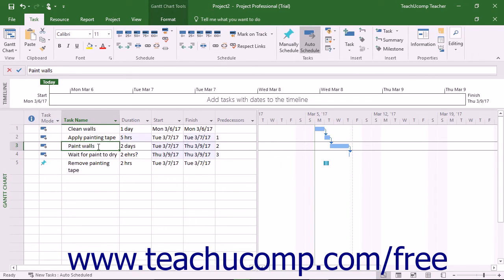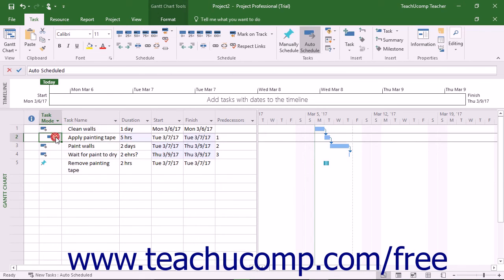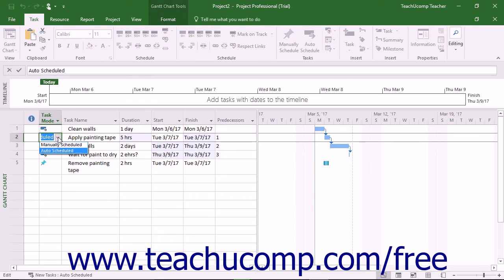To change the task mode of an existing task, use the Task Mode drop-down in the Tasks row to select either manually scheduled or auto scheduled.